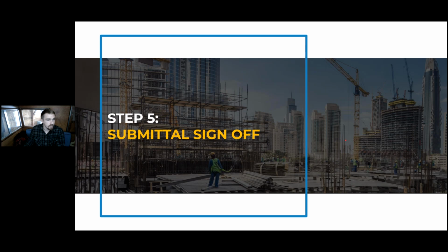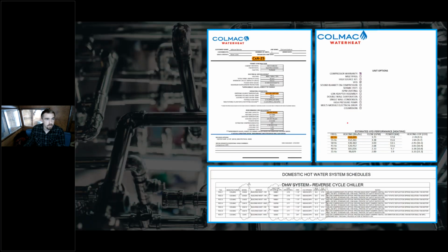And so the next step in this, after we've determined the heat pumps we're going to use and the storage we'll pair with it, as well as the controls and the mixing valve and all of the smaller components, is we're going to get the submittal signed off by the engineer and review those with the manufacturer, who is usually providing this submittal information anyways. So here's an example of a submittal from the heat pump water heaters at Jackson.